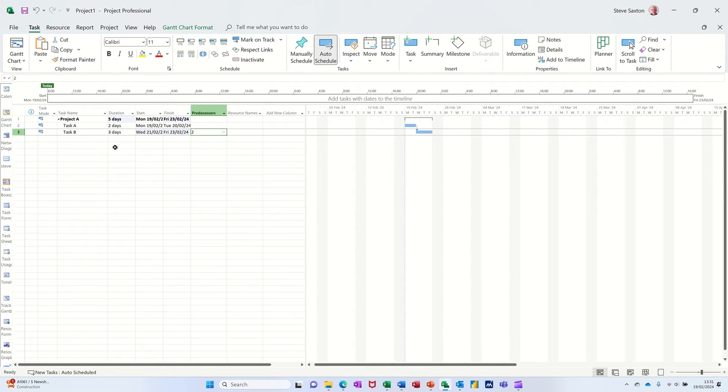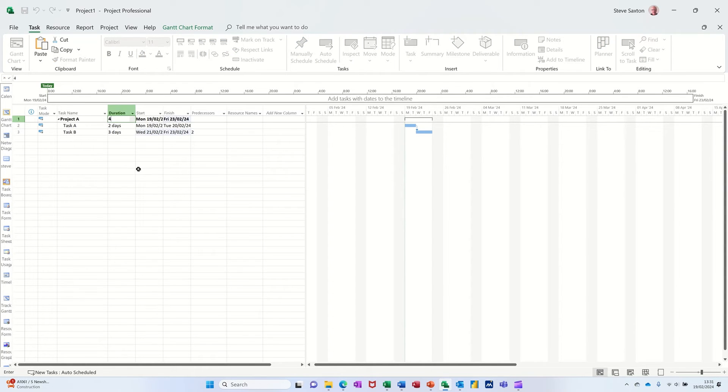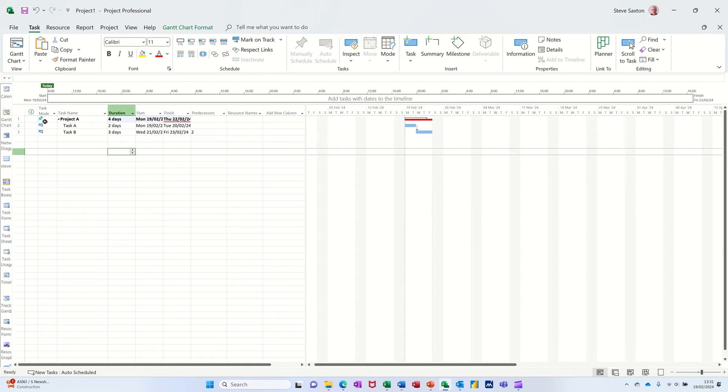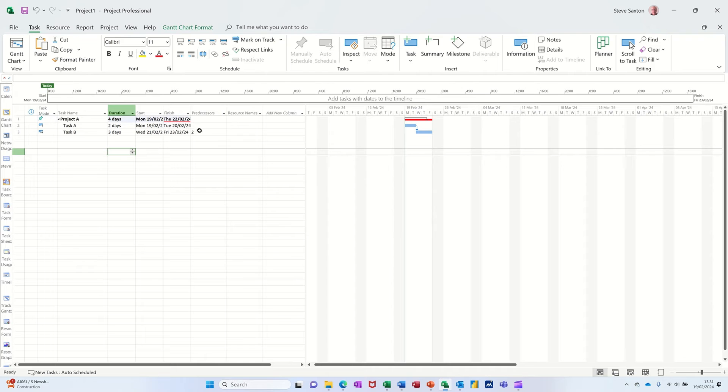The problem occurs if I do this - if I accidentally type four on that line there, what I've done is I've immediately forced this to be a manual schedule task. Now I've got a red line under the date because the duration underneath this summary is now longer than the summary is and it's not showing it correctly. You can see it there.